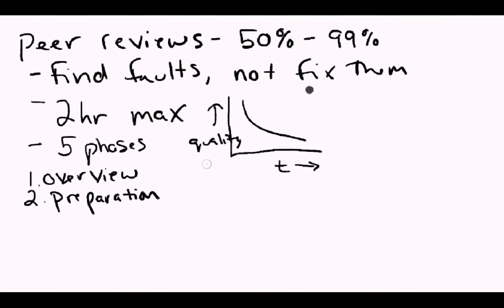And again, this is another reason why this is a somewhat expensive tool, because not only do you have to have a couple hours to sit in the actual meeting, you might also need a couple hours just to review the material in preparation for the review. So you can easily have these 5 or 6 people spend half a day doing nothing more than reviewing and then actually sitting in the actual meeting.